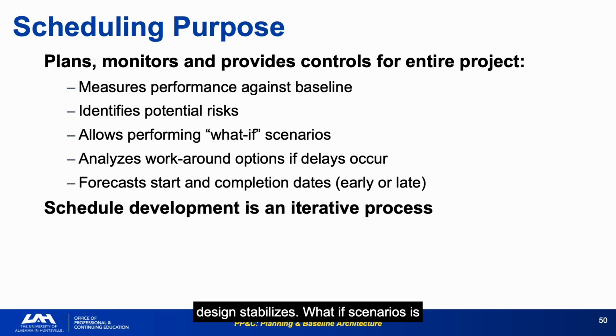What-if scenarios is the analytic capability that transforms a schedule from a tracking tool into a decision support tool. If your schedule cannot answer, what if supplier X slips 3 months? It is not serving its highest purpose. Forecast start and completion dates is where the schedule earns its credibility. If the schedule consistently forecasts incorrectly, it is either not logically integrated or not being maintained with accurate status.